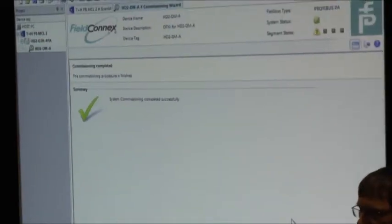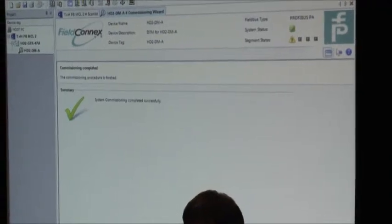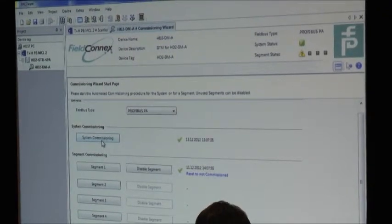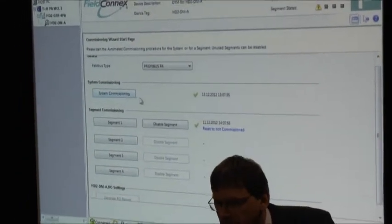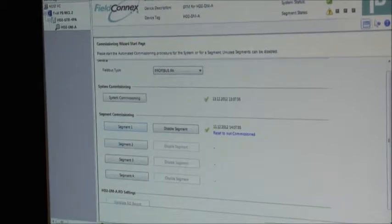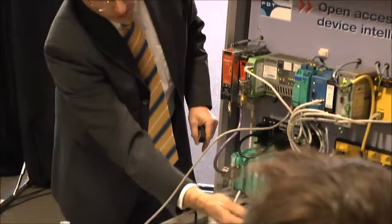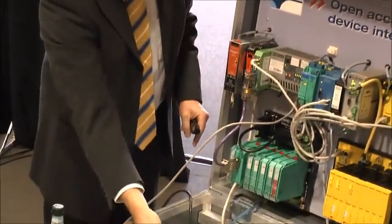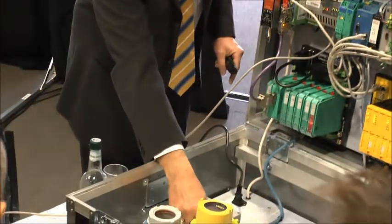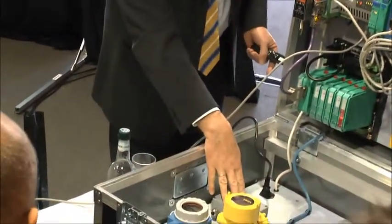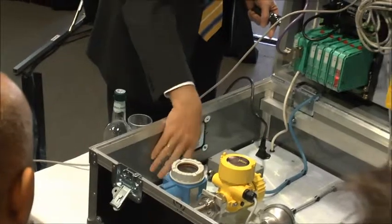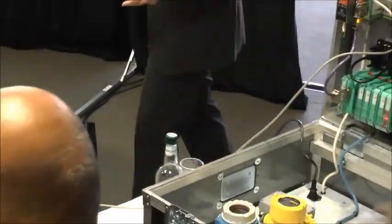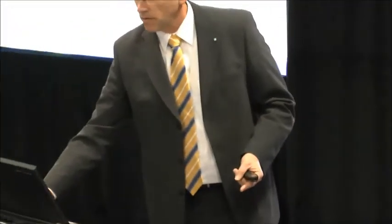The next step we have to do is, we finished commissioning of the system, which means the hardware. Now we are looking what is connected to our system, to our hardware. Are the cables correctly connected? Is the junction box correctly installed? What about the screen? Is the screen correctly connected? And what about the device here? Is it correctly connected? Is the device working perfectly? This is what we do now. We make the segment commissioning.